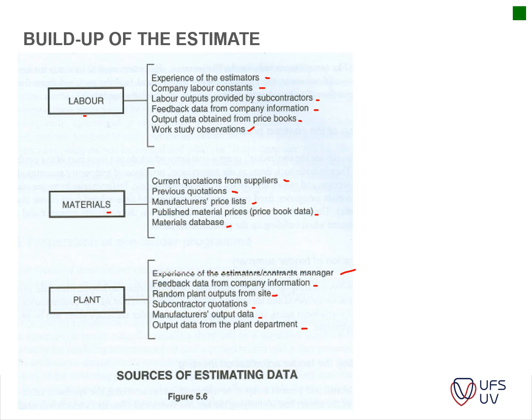Obviously, you will need to take into account that you might need some labor to clear out the excavations, and clean and level them. Is the excavated material staying on site? Is it stockpiled? Is it carted away? That type of thing has to be taken into account.